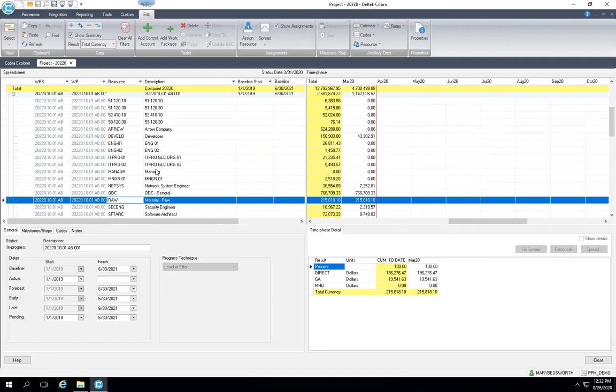Now, believe me, it takes a little bit of trial and error to get that integration to work, but it does work. But it only brings over actuals. It doesn't help with project setup, so you'd have to have your control accounts and work packages already established. And that interface only exists with CostPoint and not with any of our other tools. Vision or Vantage Point are the ones that come to mind.